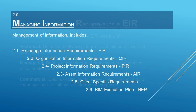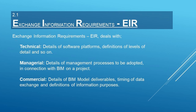Exchange Information Requirements, EIR, deals with technical, managerial, and commercial aspects. In technical details, we look at software and hardware platforms — which software and hardware systems to be used, how much detailed graphical and non-graphical information to be produced for construction and the client. In the managerial part, we focus on details of management processes to be adopted to streamline with the BIM process on a project. In the commercial part, details of BIM model deliverables, timing of information exchange, and definitions of information purposes are considered.